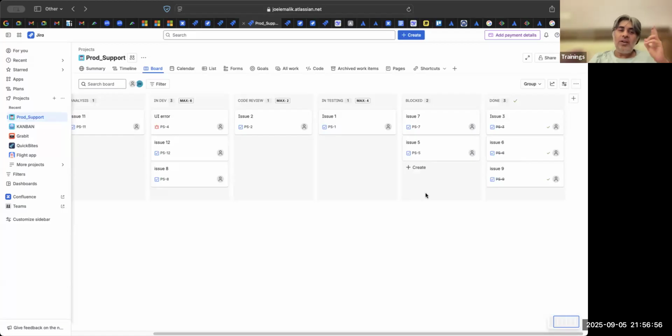So instead of saying bluntly no, say our capacity is we can only handle 4 critical bugs. If there are 8, then those 4 have to wait, or you have to prioritize which is more critical and which is less critical. If you say all 8 are critical, but your capacity is only 4. That's it. Instead of saying no, in the corporate circle we say we don't have the bandwidth to handle it.